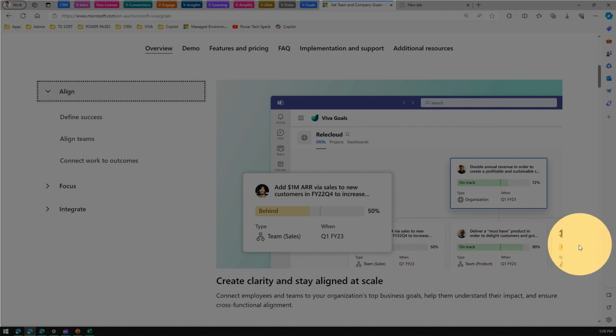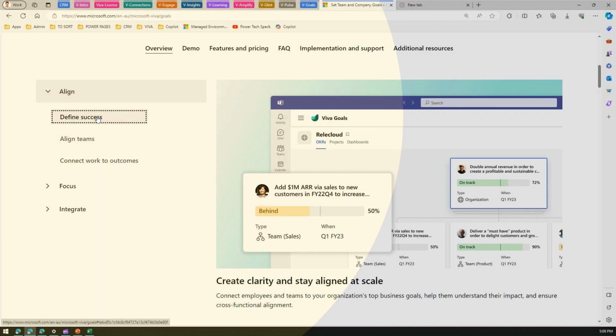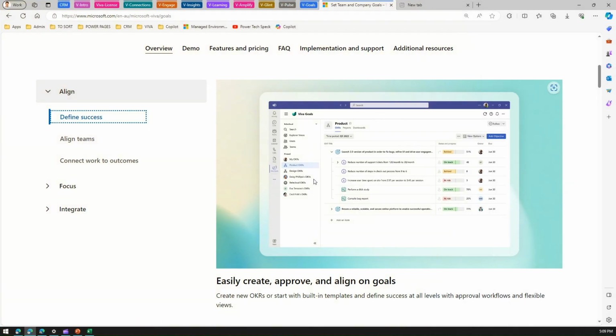Once the bottom-level hierarchy components reach 100%, they get translated or aggregated to an overall result. This 72% is not a component achieved independently, but an aggregation of this 50%, 90%, and other items. You can see exactly which area is falling behind and take corrective action. To define success, once you start defining the goals, you need to define those OKR titles, create those hierarchies, and then measure the progress. Every OKR has an owner defined, and it has a due date defined as well.